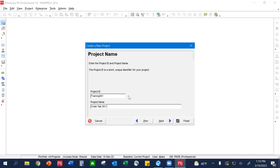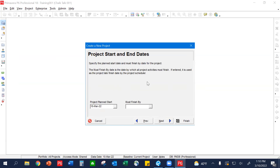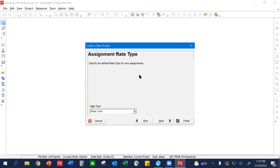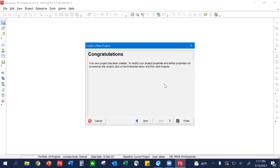This project ID is the hardest to change once you start building your schedule — they kind of lock this project ID number in. So you want to make sure this is the first spot where you catch yourself if something is wrong or if you want a different name. We'll hit Next, it'll come up with the project plan start — we'll get into that in a couple minutes, but right now just hit Next. There's no benefit for you in the responsible manager field so leave that as is. Assignment rate types is something you won't need right now — it's for cost-loading the schedule and getting into accounting and cash flow. Hit Next and that's it — congratulations, you created your project. Hit Finish.